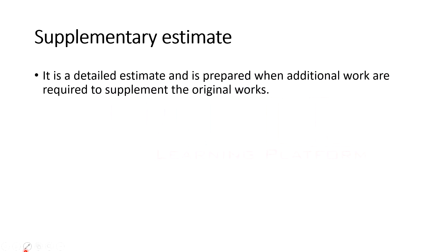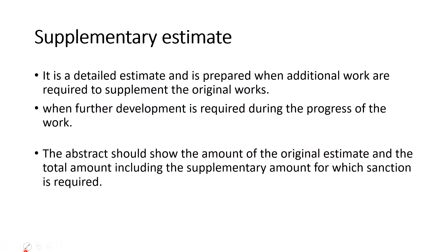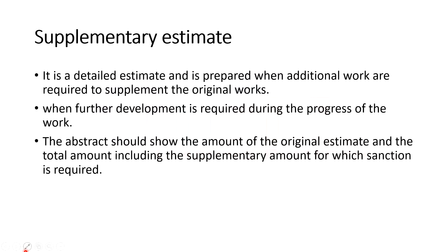A supplementary estimate is a detailed estimate prepared when additional work is required to supplement the original work, or when further development is required during the progress of work. The abstract should show the amount of the original estimate and the total amount including the supplementary amount for which sanction is required.